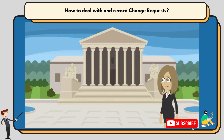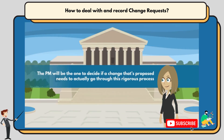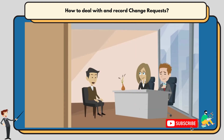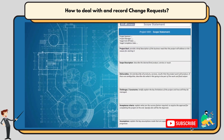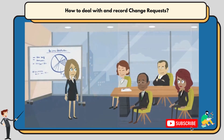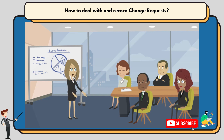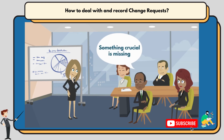It is worth noting that the project manager will be the one to decide if a proposed change needs to actually go through this rigorous process. For example, a team member requesting a couple of days off will not cost additional resources and will be covered by the buffer, so it doesn't require a lengthy process at all. Remember that the scope statement is a project manager's shield. If a stakeholder challenges the project manager, the project manager can take out their detailed scope statement and counter the challenge. However, if the stakeholder has a point and something crucial is missing, then the process is likely to be initiated.